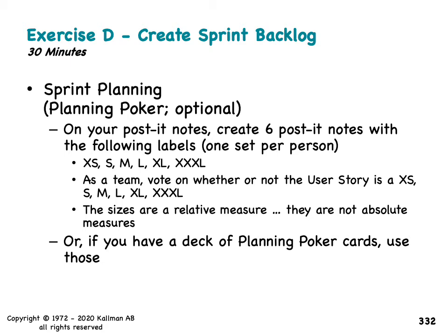Remember, we need to maximize the amount of work not done. So if your team is to a maturity level where they don't need to be doing the points anymore, get rid of them. Because in the end, the curves are going to be almost exactly identical if you're just burning up number of stories completed versus actually applying some points to that. The curves will be nearly identical.